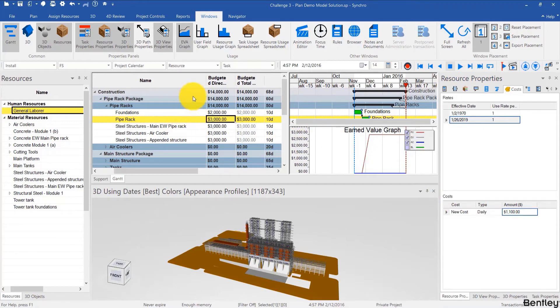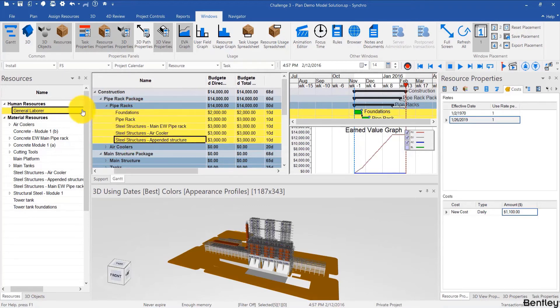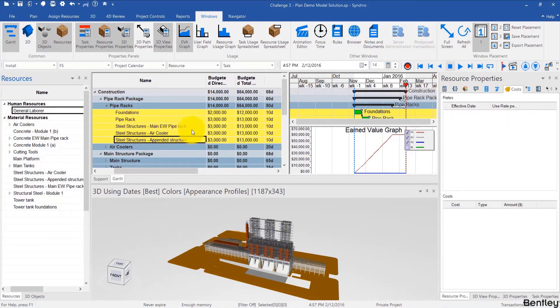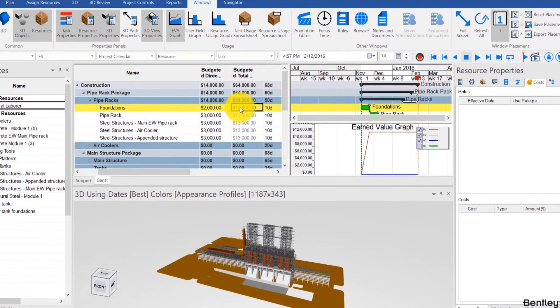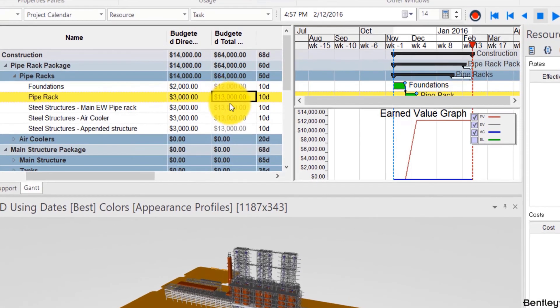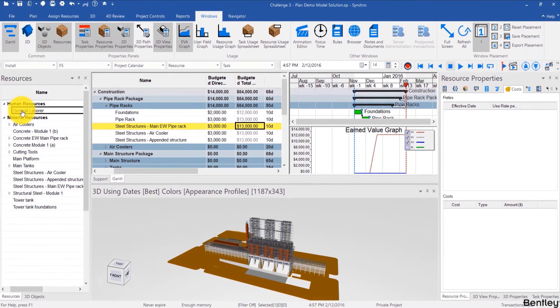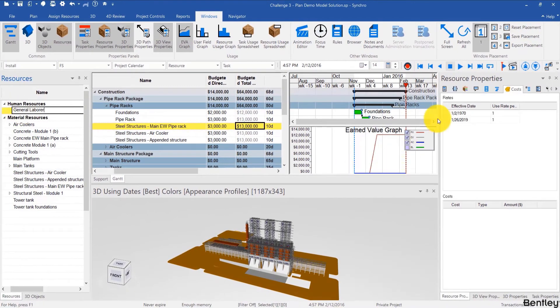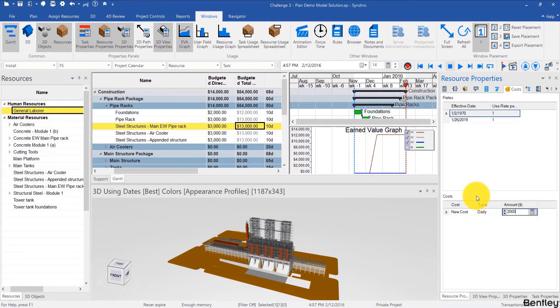Now these are not affecting anything in the schedule now. But if I assign the general labor to maybe these sets of activities by simply dragging and dropping, we see now that the direct cost is different than the total because we have some extra costs. And we see that it's a good idea because now we can modify the cost in one place and have a change in multiple areas.